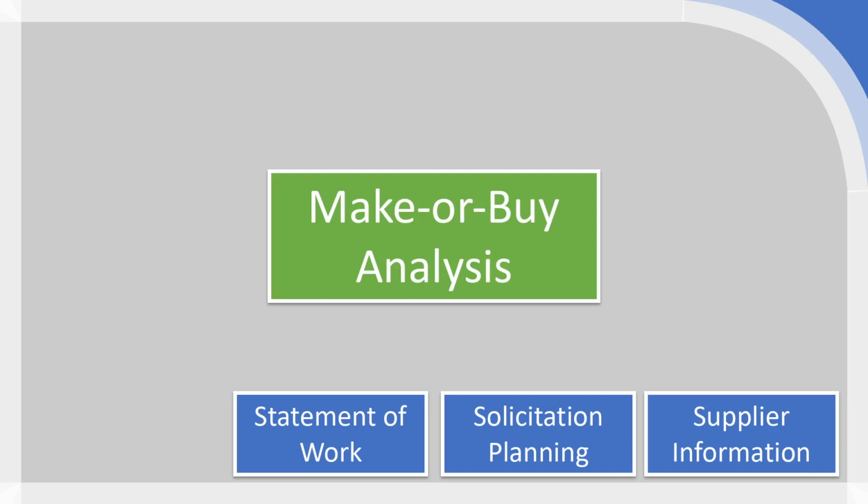Once you've identified the need, the first thing which has to be done, and which is sometimes skipped over and leads to unnecessary procurement or inefficient procurement, is really deciding, are we going to produce this in-house? So with the APM, the definition of a make or buy analysis and the central question is quite helpful, is should the items be made in-house, or could we procure them elsewhere at lower cost or better quality?